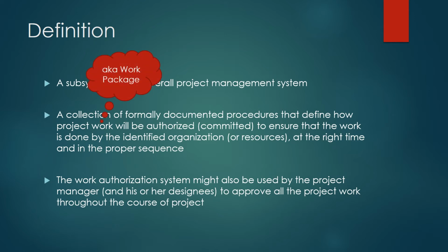Now, what is project work? It is also known as a work package, right? So in project management language, project work is also known as work package. So to assign work packages to the right resources so that they are done at the right time and in the proper sequence is the basic functioning of a work authorization system. This is the basic value that work authorization system provides.